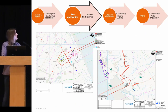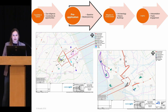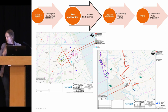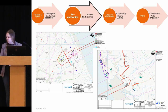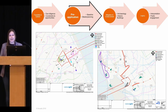Moving on to the pre-application phase—I won't go into great detail as Kate will cover this more thoroughly—but to provide background: we produced a DBA with a walkover, commissioned aerial photo and LiDAR analysis for the Paull side, and used cropmark data from the North Lincolnshire HER for Goxhill. We did geophysical survey on both sites, trial trenching at Goxhill, and a paleo-environmental assessment at Paull due to deep alluvium there. During the walkover, we identified an unusual brick-built feature—quite low, a few courses above ground, roughly circular—which at the time I honestly didn't know what it was.